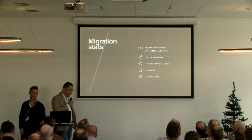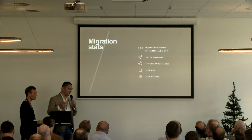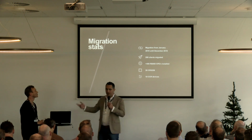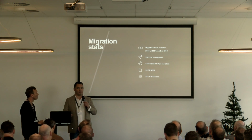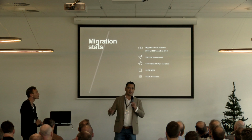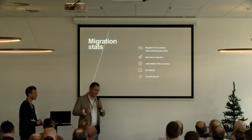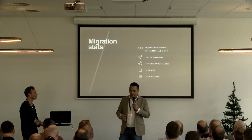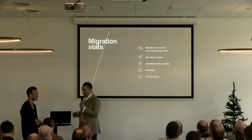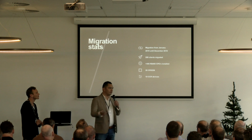Yeah, so a few statistics about the migration, because as we mentioned before, it was a backbone migration, but obviously also we had our wholesale carrier. We were moving away from carrier A to B, and obviously that made us change all the public IP addresses. That made us liaise with a lot of different IT providers. We found that particularly the Japanese are very reluctant to move away from whatever IT equipment, either that be a Windows 2000 server or their public IP address. So we really had to take quite some time to start communicating to clients that we're moving away.